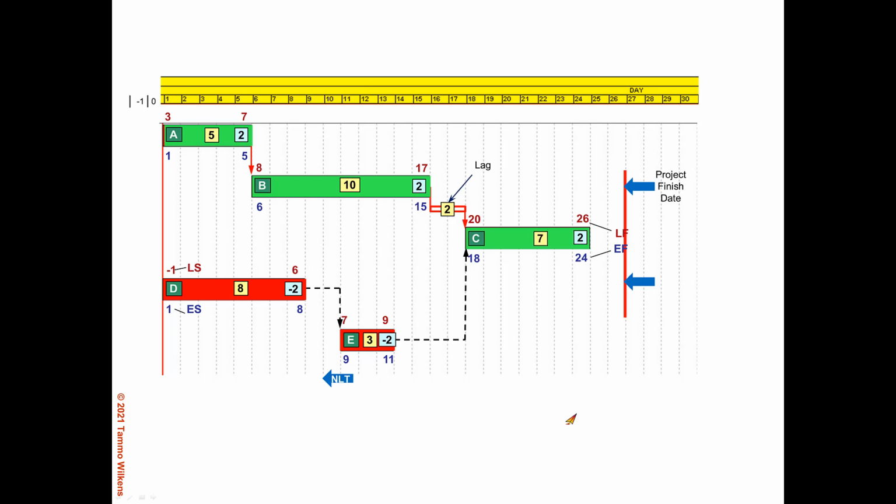So what to do? Well, it is my suggestion that PMI adopt 2 separate definitions, one called critical path or critical activity, and go back to the scheduling profession's use of the term critical if the float or slack is 0 or less, period, whether that's on the longest path or any other path.